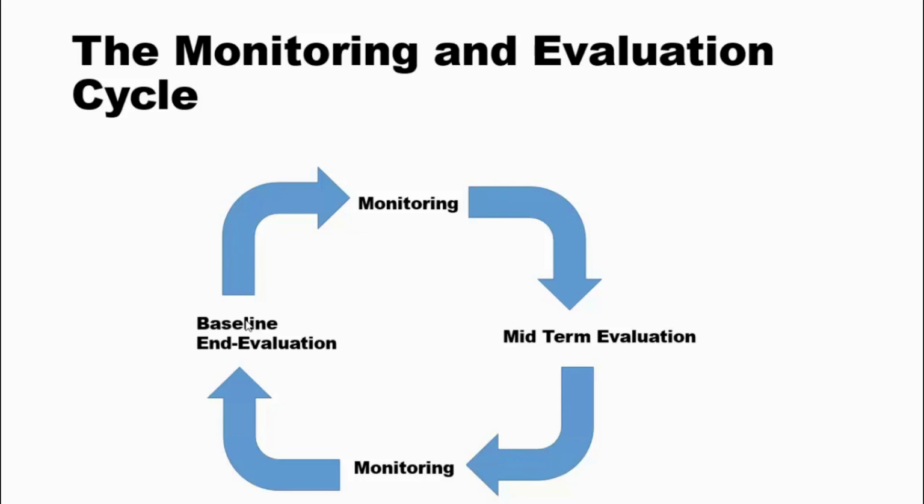But there are certain indicators that may not be at zero value, such as attitudes, perceptions of people at that time, or income levels of people at a certain time, poverty levels at a certain time. It may not be at zero. Okay, so that's why you need to do a baseline.